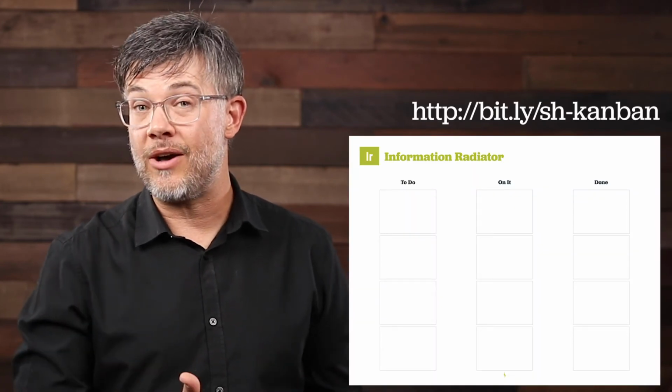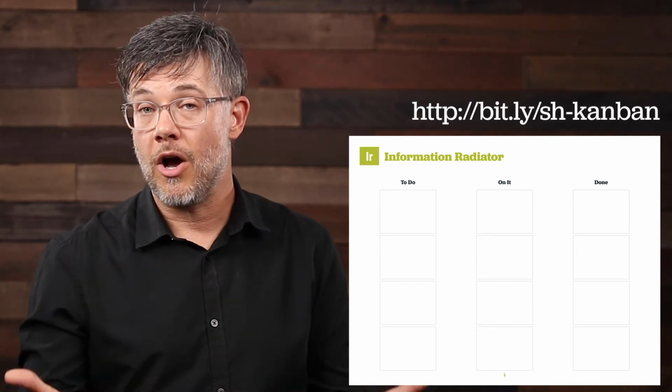The Kanban board has been super powerful for us when we're doing a hack-in. So we'll have a big deadline that is looming, we'll get everybody together in the conference room, and then we've got a Kanban up on the board, on the wall, and everybody can look at it and see, okay, I'm gonna take this task, I'm gonna work on it, everyone in the room knows that I'm working on it, and then when I get done with it, I move it to the done column. So at any point, anybody can look at the wall, find something to work on, and move it to the done column. We always want to share the tools and techniques that work for us, so we've created a worksheet that you can download and practice doing a Kanban board on your own.